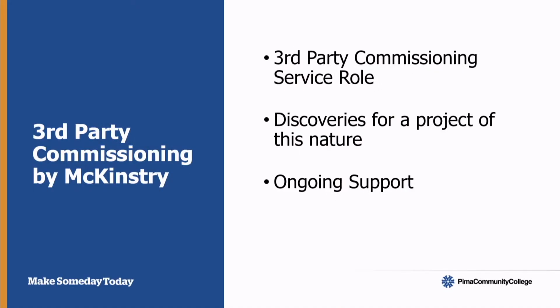In this slide, I'm going to go over the McKinstry report. Whenever you have a large-scale project and you're making significant improvements to your HVAC systems, whether it's replacing or improving the actual systems themselves, or the controllers, there are all these very unique pieces that need to work together to ensure that what we said we wanted them to do, they're doing it. So it's very common that we incorporate the services of a third-party commissioning agent. For this project, we hired McKinstry to provide that for us.